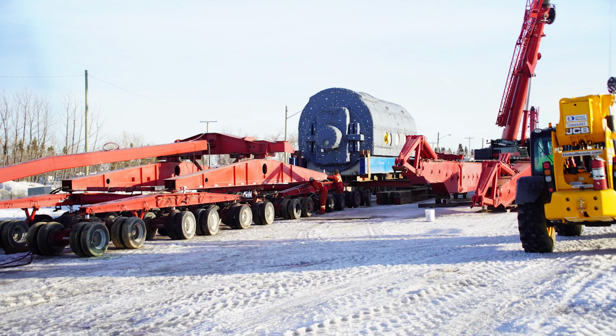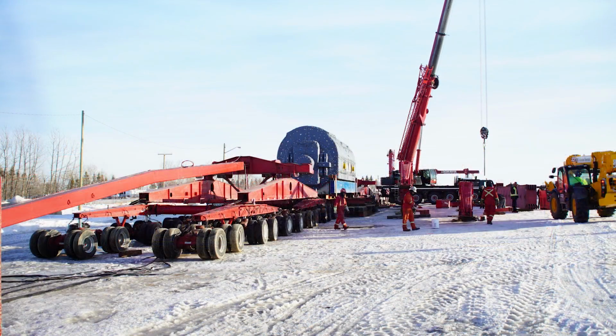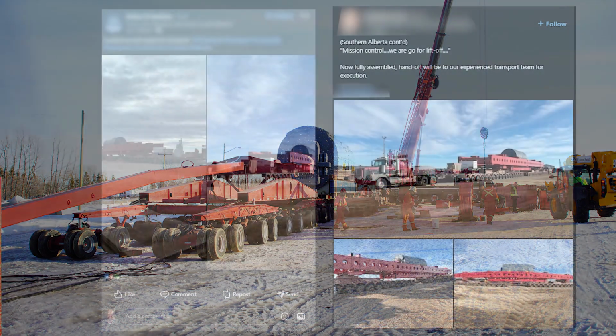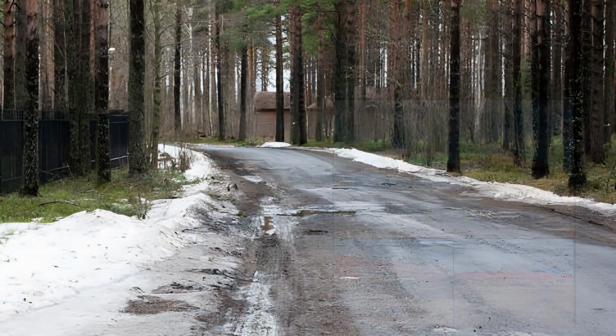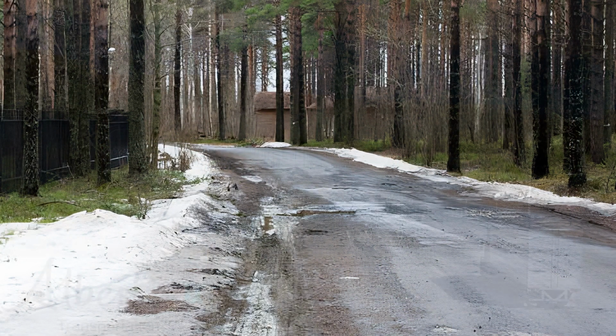However, in January 2022, roughly 20 days after Barnhart demobilized, the client contacted Barnhart asking how quickly we could mobilize equipment and people into Alberta. The Barnhart team was shocked. We had been closely watching the progress of the Canadian heavy hauler, and we thought the transport was underway because frost laws and road restrictions were set to begin in the next 8 weeks. These frost laws are seasonal restrictions on traffic weight limits and speeds on roadways subject to thaw weakening.